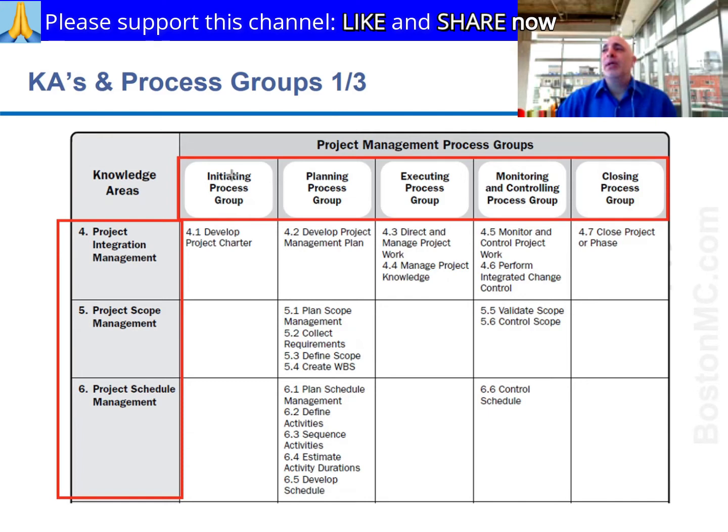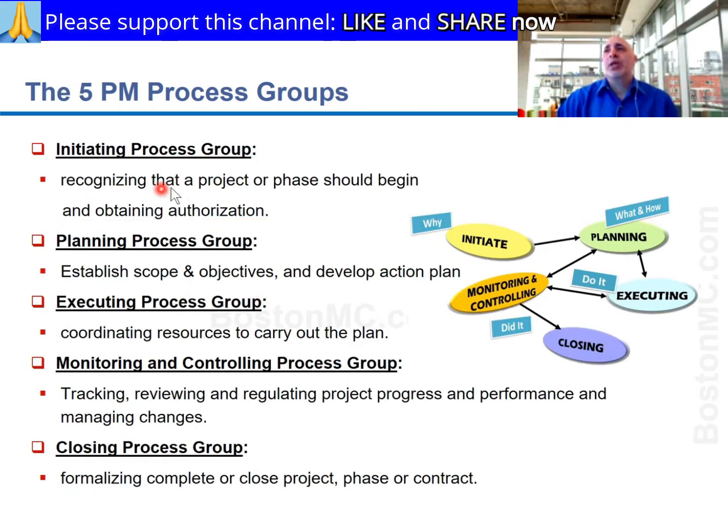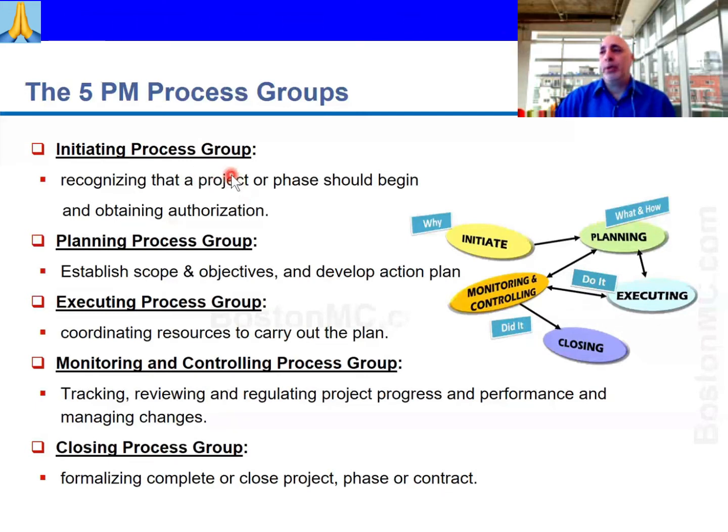The initiating process group is the one that starts the project going. This is where a charter is initiated. This is where your change management plan is developed. This is where you start creating your project management plan, but you will not finish it here. You will also identify your key stakeholders. Mainly, knowing your charter and your stakeholders are part of that initiation process. You could do your kickoff meeting here. These are the things you do to get a project going.